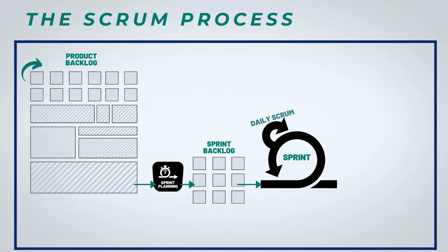The last day of the sprint, the team and interested stakeholders attend the sprint review event. During the sprint review, the team shares what work it has completed during the sprint and gathers feedback from the various stakeholders. The sprint review is sometimes referred to as the sprint demo. The team should show actual completed work products and avoid slides. Seeing actual work products builds confidence within the Scrum team and with stakeholders.